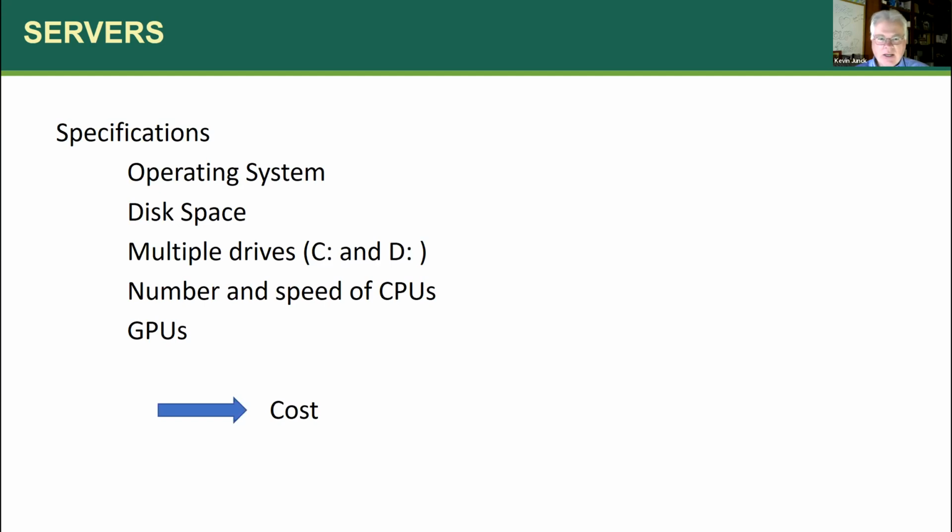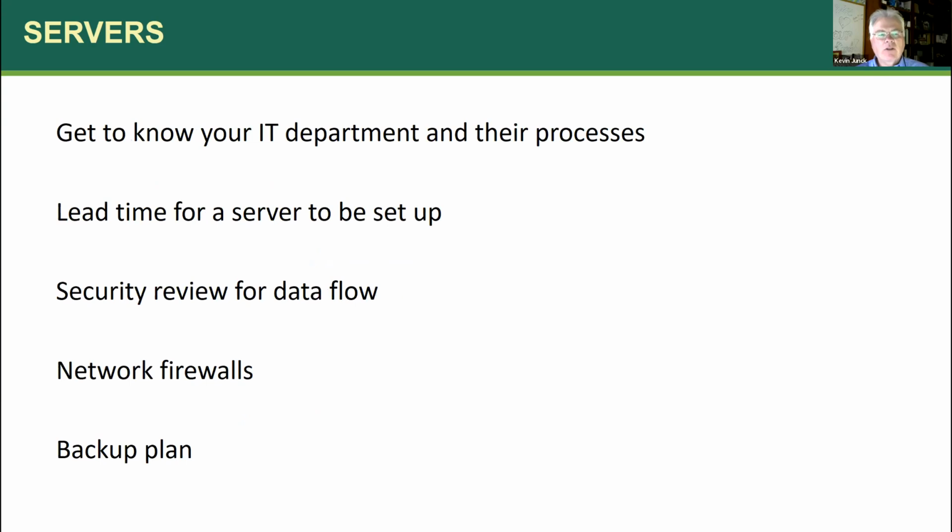Okay, so getting servers set up, feeding into that whole thing. So one of the things, if you're going to be involved in AI implementation at your facility, get to know your IT department and their processes. They're going to be instrumental in approving things and getting things set up, and you've got to know what their processes are and what the sort of lead time is for a server to be set up.